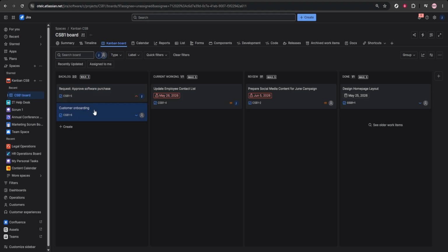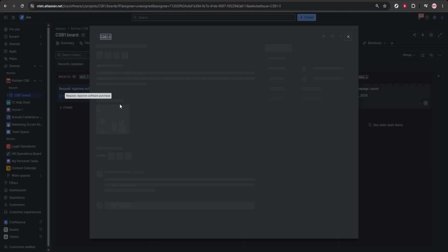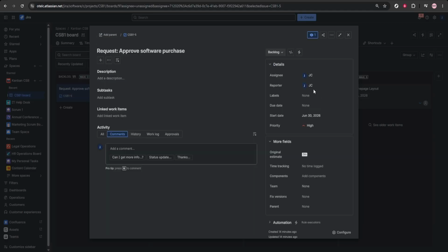As requests start coming in, take time to prioritize customer needs. Open your backlog or issue list and review what's there. Set priorities based on customer impact, business value, and urgency, then rank the most important work higher. This helps your team focus on what matters most.